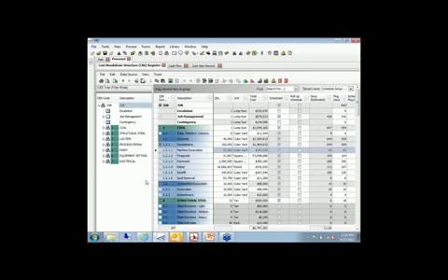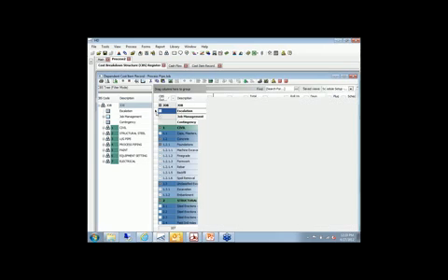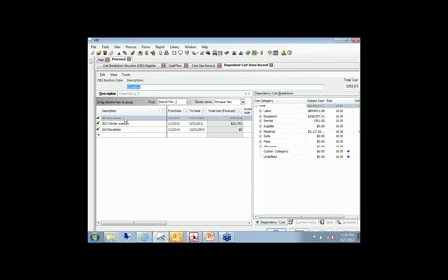One of the major use cases, though, for this integration is, if you think about any estimate or any cost model, there are going to be things in there that are, if not everything in there, a function of the schedule. So some very simple things that we'll focus in on, for example, at the top you see escalation. You see job management. If we go into escalation in our cost model in hard dollar, you're going to see a standard table that we're putting into all of our estimates as a user. We're saying, hey, any work that happens in 2013 is going to be escalated, right? And if we get into 2014, it's going to be escalated.